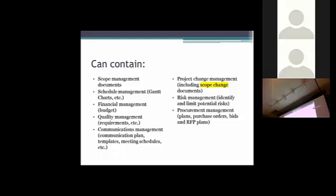risk management. One of the things I've discovered in project management is you sit down during the planning process and come up with every possible risk that your brain can come up with, and this is where a brainstorming group is helpful. Risks that are considered more or less likely. You've got them in your sights, like the risks of people getting sick, staff being ill, so you've already kind of thought about, well, if so and so gets the flu, then we'll need to maybe bring in somebody else. Or you've already considered how you're going to handle it, and when it happens, it becomes much less an issue because you've already kind of got a plan.